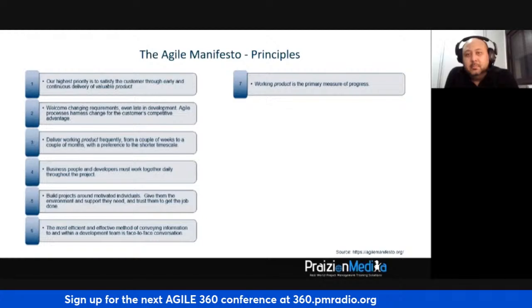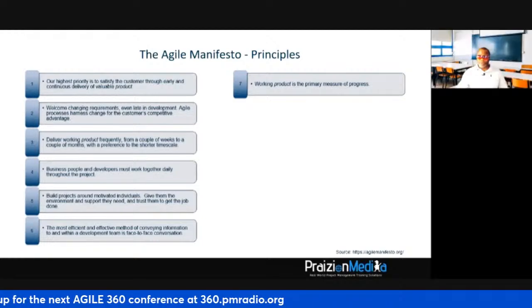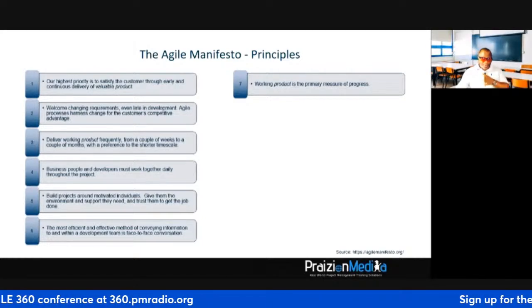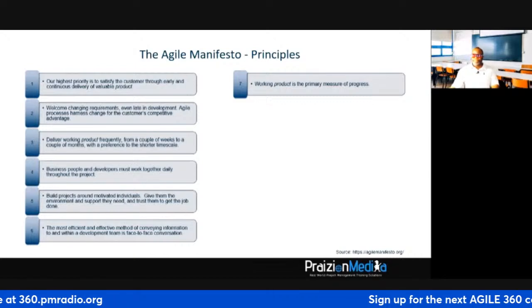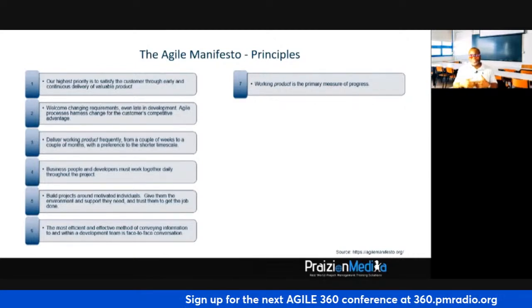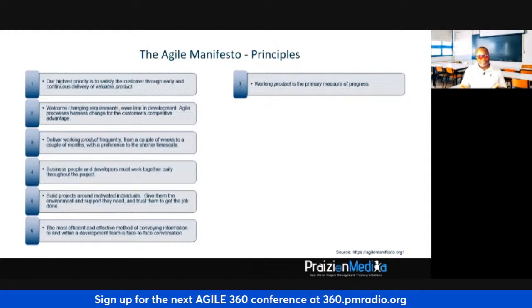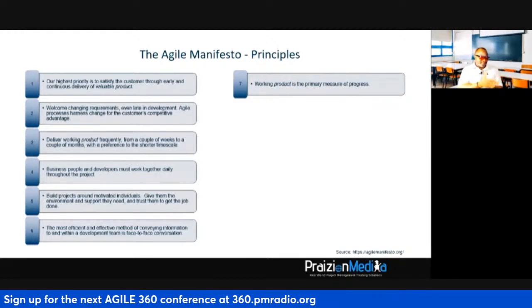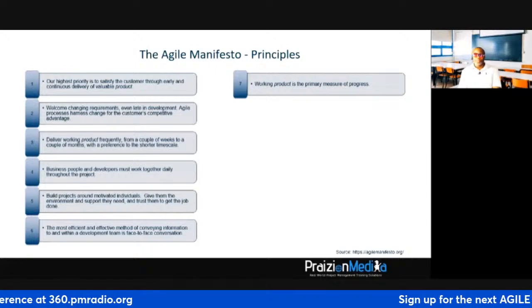If you're doing things in 2-week sprints or even 3 weeks or 4-week sprints or iterations, same thing, we already know that at the end of 4 weeks, you're done. So what is the point of doing percent completes? It's only a waste of time and a distraction.